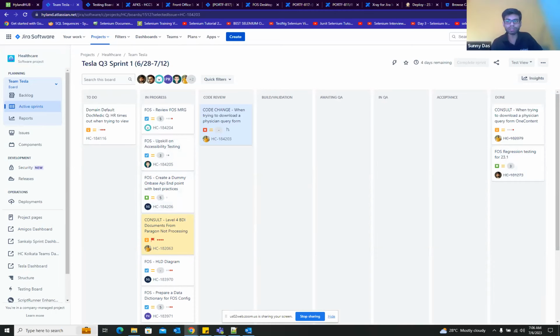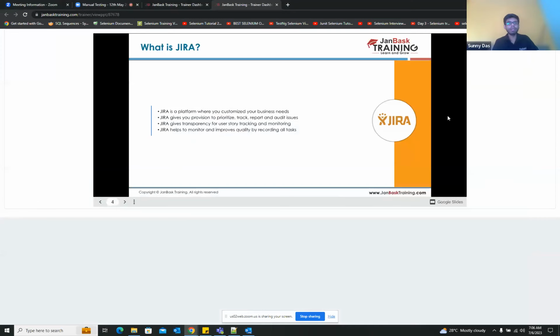On the first day of the sprint planning, your whole team needs to provide this story point as an estimation of how soon that particular task or story can be completed. It's both individual and teamwork.